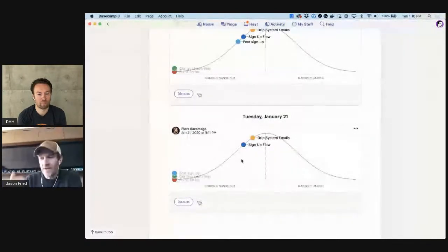Work is not logical in this way. You can't just count up the to-dos and move something up a hill, because again, the one remaining to-do might be a massive unknown. The team has control, and the team knows how they feel about the work that's going on. So this is all about intuition and feel, and discussions and conversations about where they think they're at, and they put something on the hill.